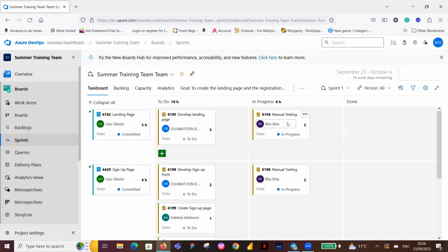The one we did on the estimate board is effort, and when you're estimating in effort, there are things you consider. You consider the risk involved in carrying out that work. You consider dependencies that might be in place. You consider things like the volume, the complexity, the technicality of it. That is what you put in place, which gives you insights based on the description and the acceptance criteria. That's what makes you able to estimate in effort.